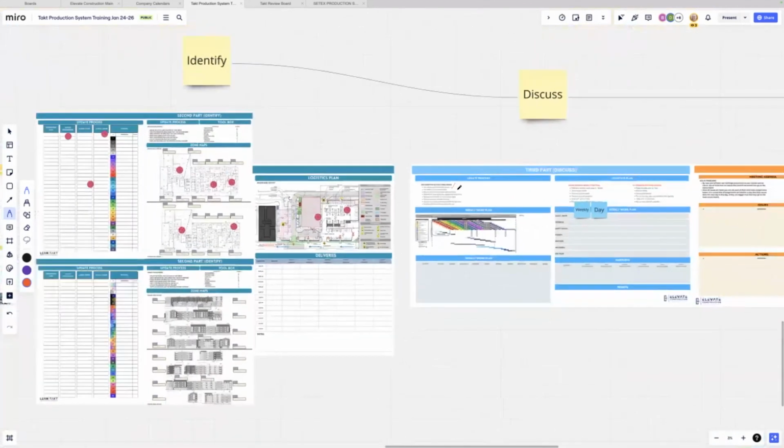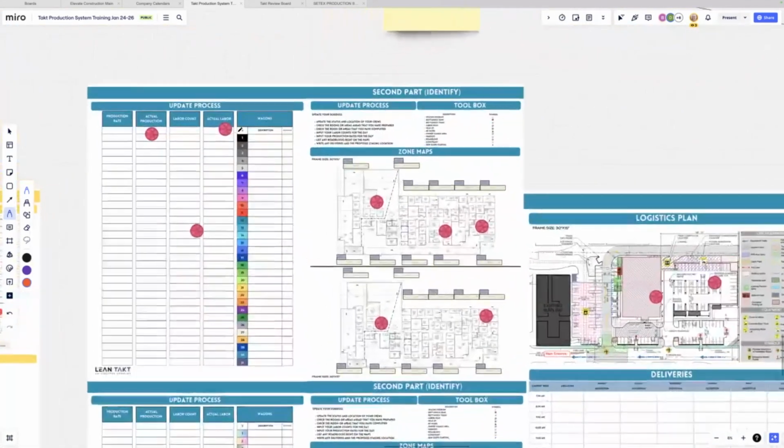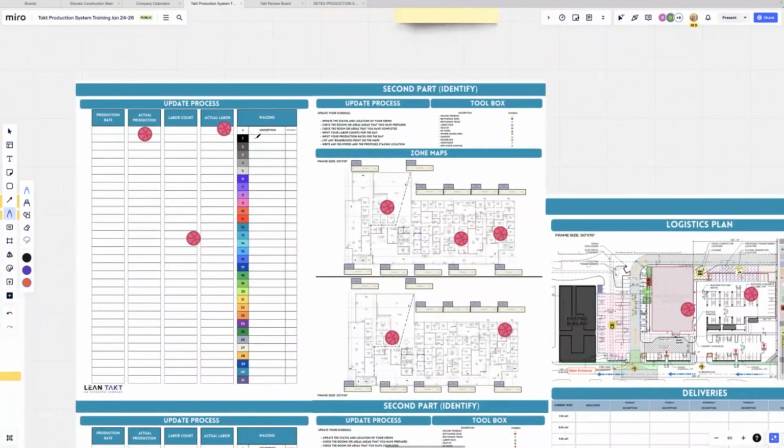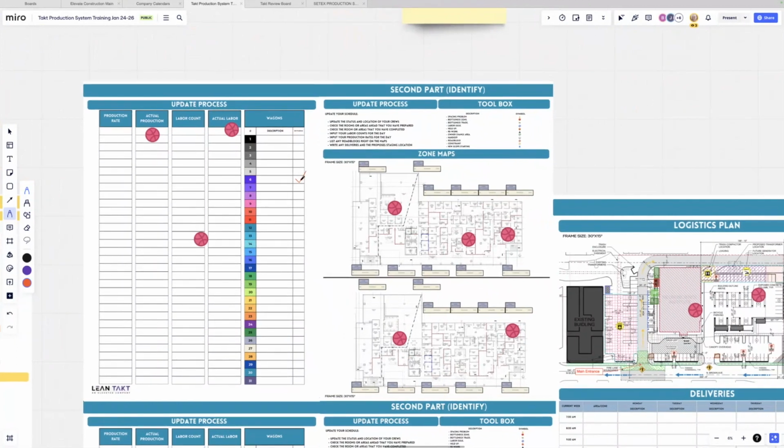And hopefully you would be able to come over here and use these wagon descriptors, which will show each of the trade partners, each of the activities. You should be able to check mark and say, yeah, I think wagon number 6 is still the slowest one. And you as a leader will reinforce, hey, that is not making fun of wagon number 6. Nothing is going wrong. Something about that work is taking quite a bit of time and creating our pace.